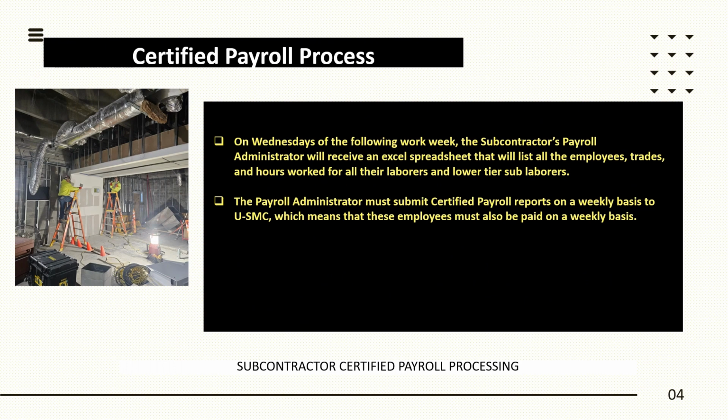On Wednesdays of the following week, the subcontractor's payroll administrator will receive an Excel spreadsheet via email listing all the employees, their trades, and the hours worked. They in turn must submit certified payroll reports to Upside Management on a weekly basis corresponding with their weekly payment cycle.